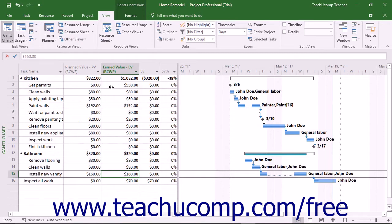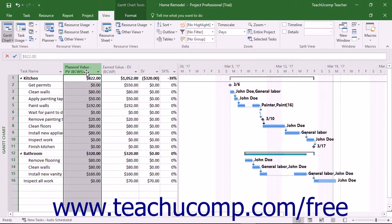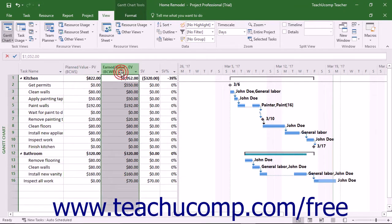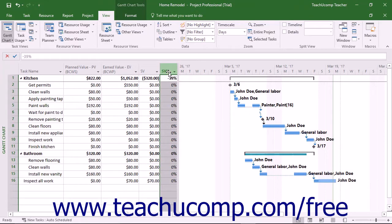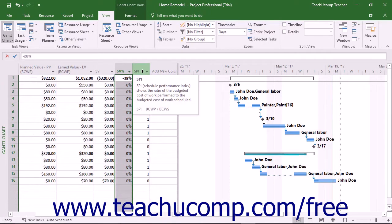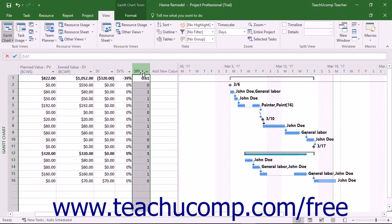Remember that these values are all set as of the selected status date for the project file. You can change that date in the Project Information dialog box to change the numbers in this view. This view shows the following data: the Planned Value, which is the budgeted cost of the work scheduled as of the status date; the Earned Value, which is the budgeted cost of the work performed as of the status date; the Schedule Variance, which is the difference between the EV and the PV values; and the Schedule Variance Percentage, which is the ratio of the SV to the PV expressed as a percentage.